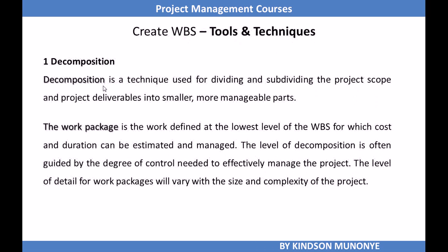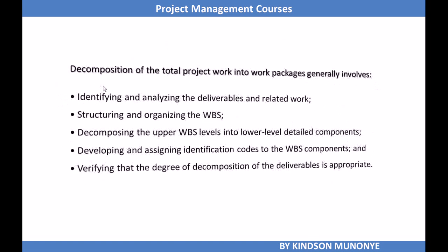The tools and techniques are decomposition. Decomposition is a technique used for dividing and subdividing the project scope and the project deliverables into smaller, more manageable parts. The work package is the work defined at the lowest level of the WBS for which costs and duration can be estimated and managed. The level of decomposition is often guided by the degree of control needed to effectively manage the project. The level of detail for the work package will vary with the size and complexity of the project.